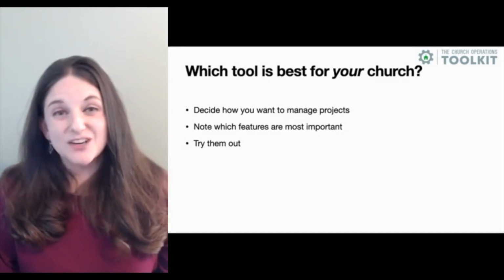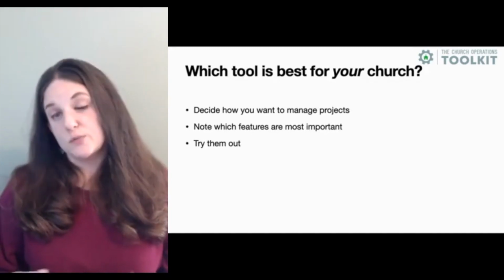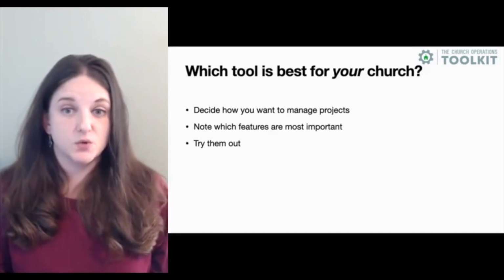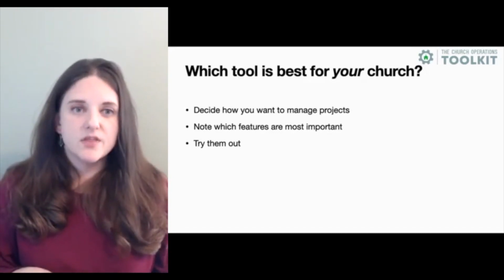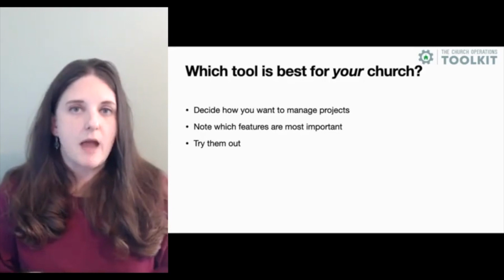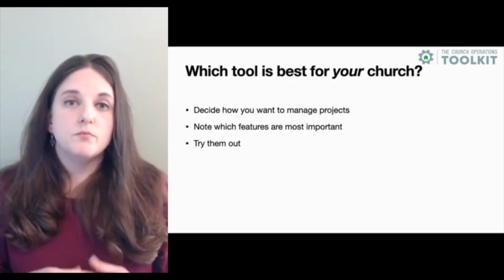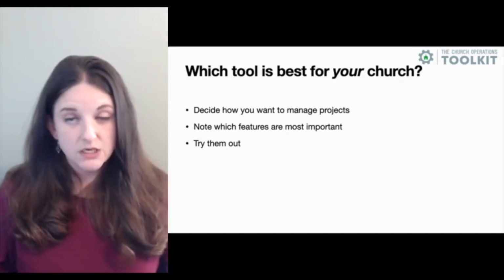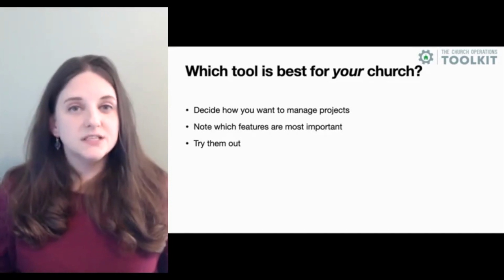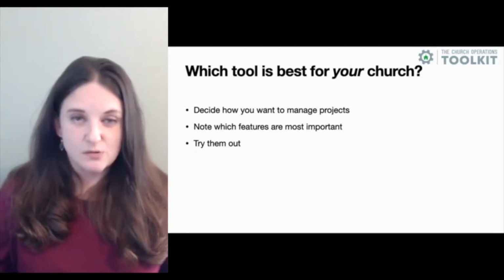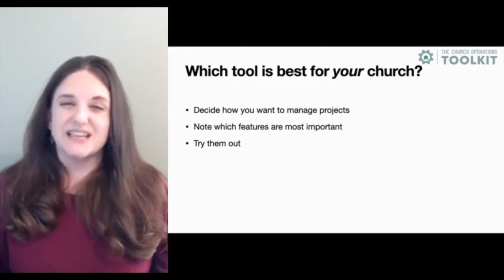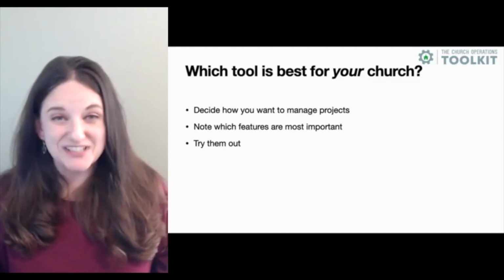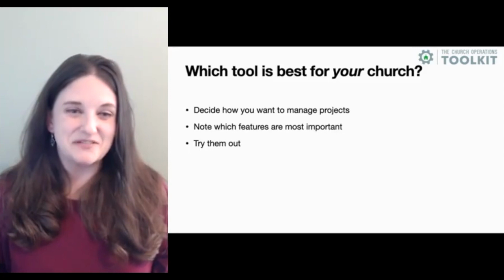You might take your average Sunday service or maybe a sermon series and use that as a project within a tool. Something that you can contain within 4 to 6 weeks max, so that you can run all the tasks through the tool, have 2 or 3 people use it. You don't need to get every single person on staff and every volunteer that's going to be involved when you're just testing something out. Get a few people in there to kind of kick the tires and see if you like it. Take it out for a test drive.